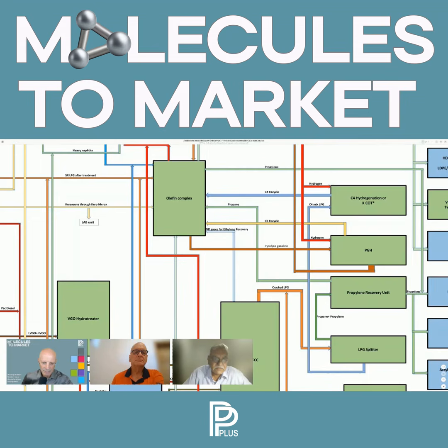We'll just look into the diagram and then we'll see what it is. But 70 to 80% of the technologies can come from them. For the balance of technologies, which he does not have, the owner will facilitate a technology, but make an agreement with the licensor that he will perform the work of managing licensor. That means he will co-opt those technologies and integrate them in the configuration for optimization. So the best possible configuration gets optimized through the managing licensor route also.